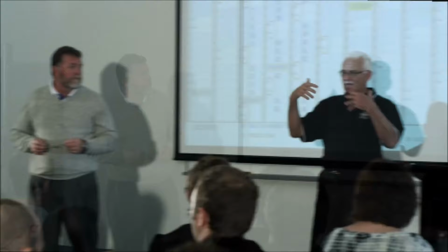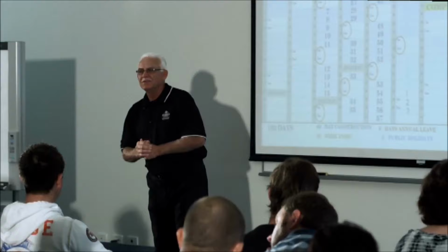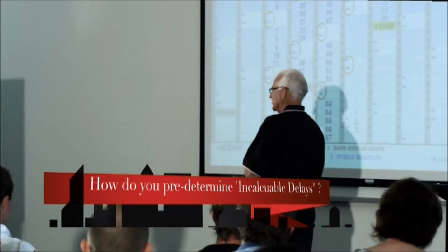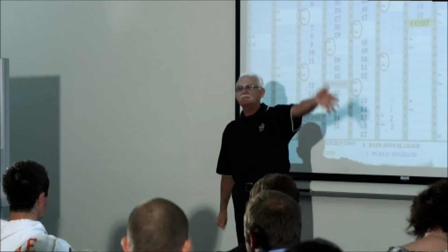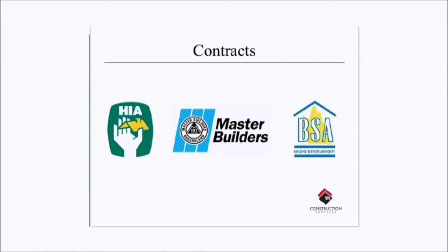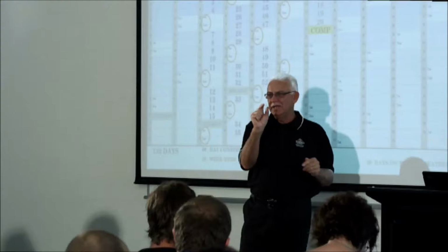Thank you. I just want to go through what we've done this morning. Have you got any questions? The question was, you don't know what the incalculable delays are when you're signing a contract. Basically, we have a stab at it, and we use Master Builders and HIA, but they have actually developed a guide. They've taken the last 50 years and put together how long it has actually rained and what effect it has on builders in that month.